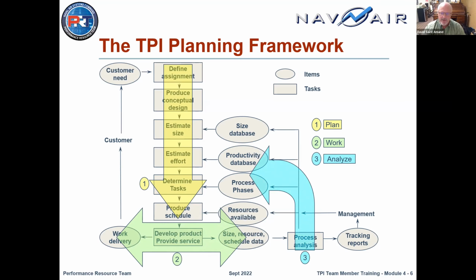We thought it was this big, and it was actually this big. We're off by some certain percentage. We thought it was going to take this long, and it actually took a little bit longer than we thought. So in future estimating, you can go back and adjust your estimates for the historical data that you're collecting.